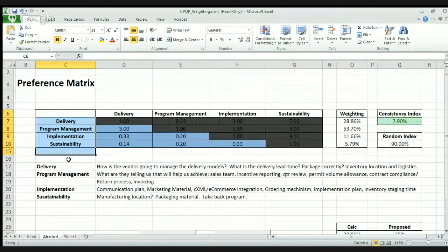Let's say that I cared deeply about sustainability, and my question had to do with how far the product has traveled. Well, miles is a naturally occurring scale, and if I use that, then any two people can calculate the miles that the product traveled and come to some kind of answer, right?